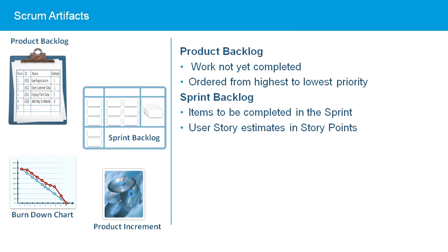Sometimes the team may add, delete, or modify tasks in the sprint backlog as the team works through the sprint and gains a deeper understanding of what is needed to complete a user story. However, no new functionality can be added while the sprint is in progress.